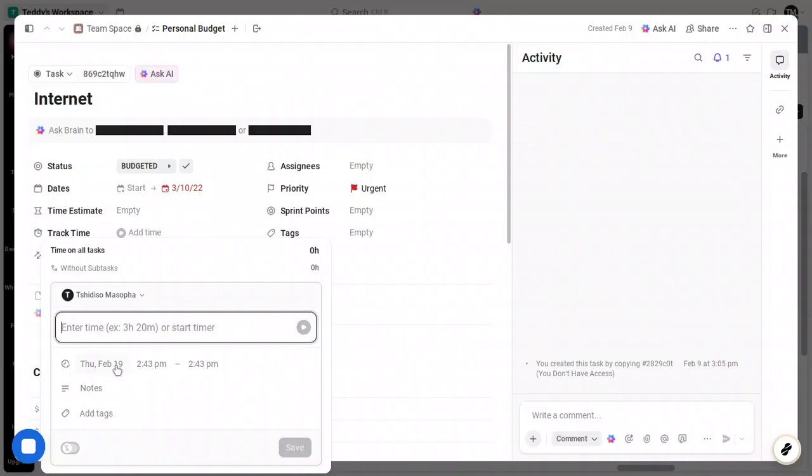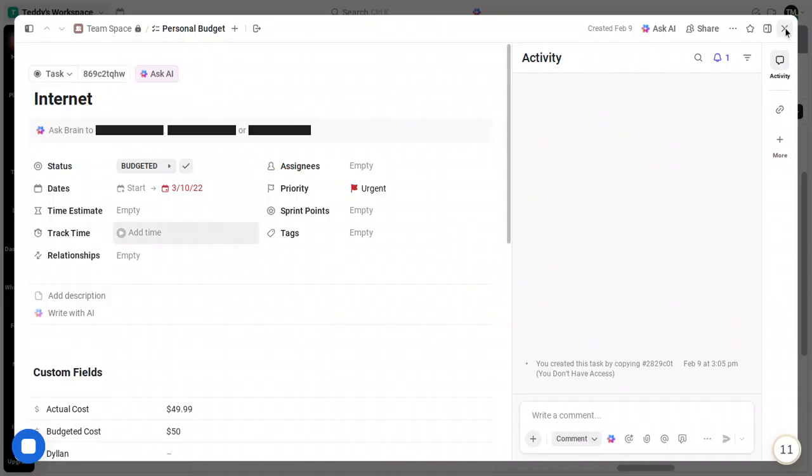You'll notice the taskbars might still look similar at this point, often using a default color. That's expected because we haven't told the chart how to apply colors yet. To do that, look toward the top right of the Gantt view for the Settings or Options icon. Click the Settings button, then choose More Options. In that menu, find the control labeled Color Tasks By. This is where you pick the logic behind each task's color.